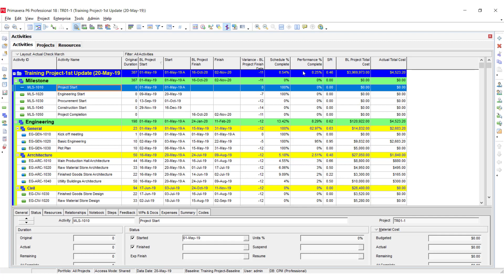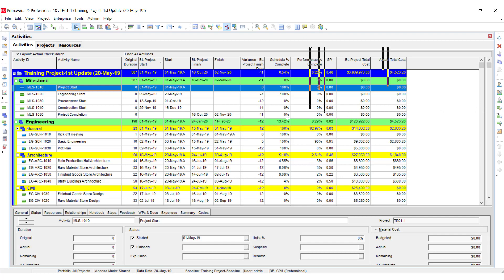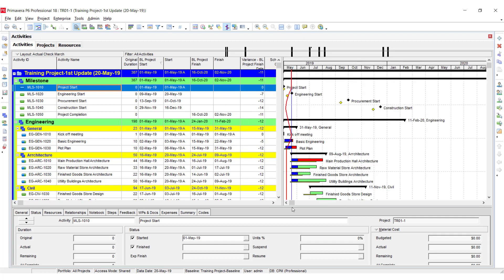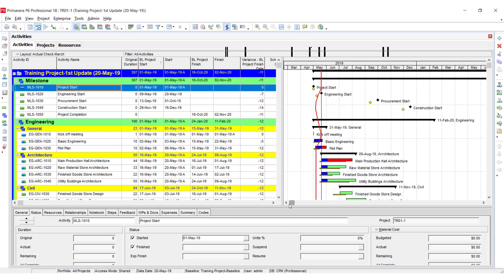According to the baseline schedule, we were planned at 45.4 percent and our progress is 20.25 percent, meaning we are 0.29 percent behind the progress. Here you can see the project baseline cost and the actual total cost, which is updating based on the progress we have entered.